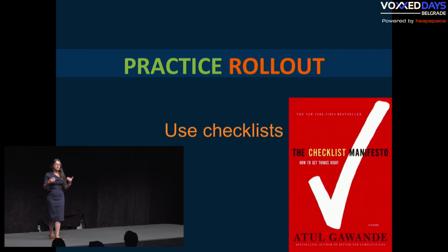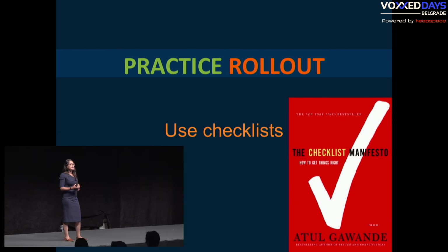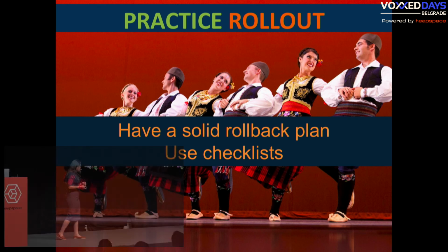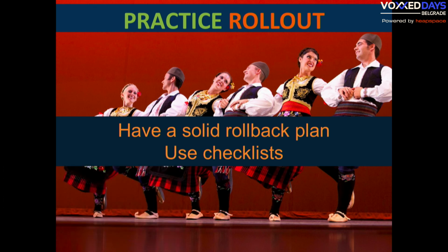It also allowed us to plan for organizational resilience. If somebody is on vacation or becomes sick, it was really easy for anyone else to step in and pick it up. So in order to ensure the success of migration, make sure to also practice the rollout. Have a solid rollback plan, and ensure you have checklists just so that the whole team is on the same page, and anybody could step in if the main leaders, the people who have been involved most in the migration, for some reason can't help out at that point in time when we need to keep the migration going.